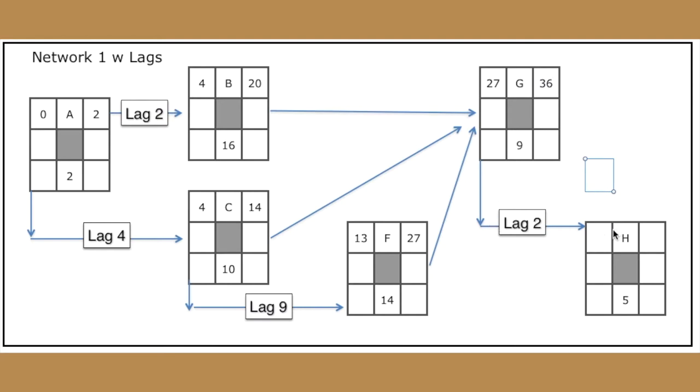And then when we do our calculation for H, we're going to see that H is not dependent on the finish of G, but on the start with a lag of two. So this can start two days after G starts. So the earliest it could possibly start is in time increment 29. Do our normal calculation here, we come up with 34. We're going to put that 34 down here, subtract 5 from it, and get 29 again. So we have both a slack of zero if we do the calculations on both the start as well as on the finish.